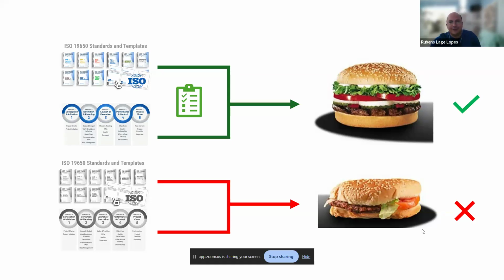Okay, and in terms of model, not sandwich, it means that it might not be coordinated, missing information. For example, the structural team needs the weight of the equipment so they can calculate the structure, of course. And so they receive the wrong size, the wrong weight of equipment. So the structure is not fit for that equipment, or then the size. When you buy the equipment and you go on site, you can't fit it there because it's just not the correct information, it's not the correct size.